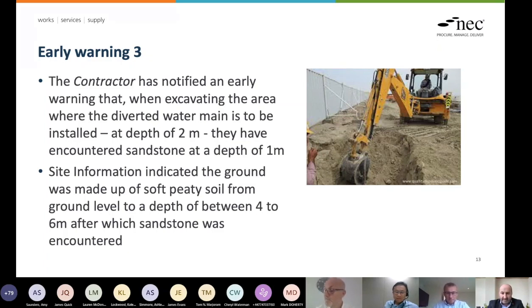So Matthew, you happy now? We can delete this one, please. Hold your horses. Hold your horses, Ian. Listen, we've only just discussed this. We haven't resolved it. I haven't even given Rockshaw an instruction yet. So I think we keep it on the register. And then next week's meeting, we'll look at what we've achieved, what the outcome is, what the way forward is. Let's just review it next week. I don't think we've actually solved it yet, Ian. Sorry about your KPIs, but we do need to make sure we don't take things off before we've resolved them.